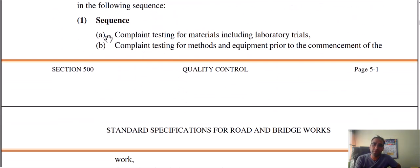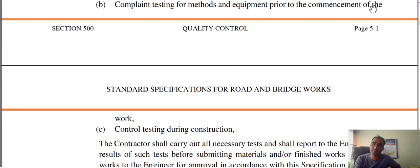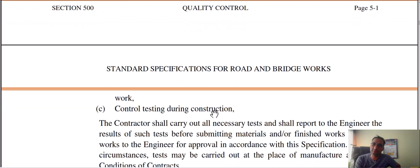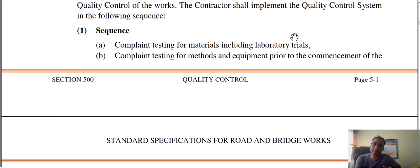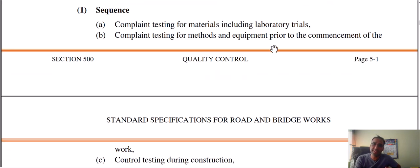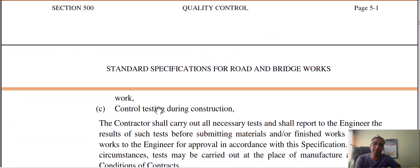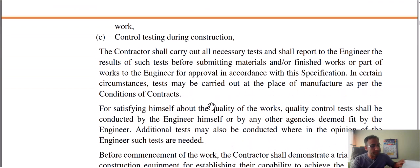The quality control system follows a sequence. In this sequence, we have compliance testing for materials including laboratory trials. The material must be spec-compliant for laboratory trials, and the method and equipment must be compliant for testing — prior to the commencement of the work. Then there is control testing during construction. The contractor shall carry out all necessary tests and shall report to the engineer the results of such tests before submitting the material and/or finished work to the engineer for approval in accordance with the specification.